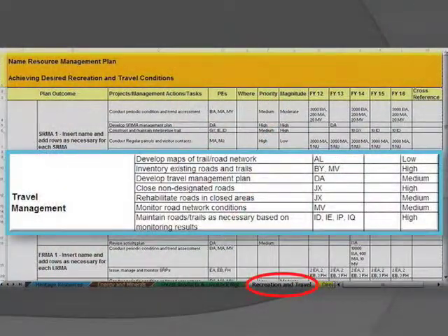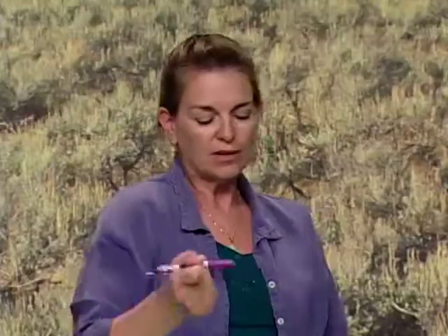Following travel management plans, projects include close non-designated roads, construct and maintain roads and trails, and monitor roads and trails. So the tasks and amounts would be more specific after you finish the travel management plans, similar to the ACECs, right? Right. We'll know more about where signs are needed and road closures should take place once the plans are done, and we'll enter those into the sheets.